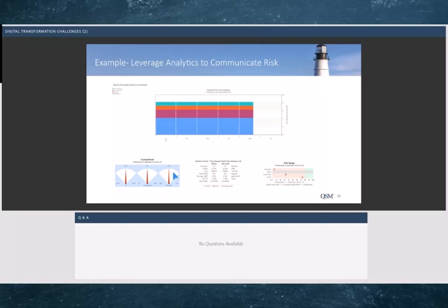And is that reasonable? Or that productivity measure, remember the PI, productivity? What if we could work more efficiently? How much time and money would that save us? If we could work to a 16.1 instead of a 15. By the way, before we sign up to a 16, we want to make sure our historical data shows that we've done that before.